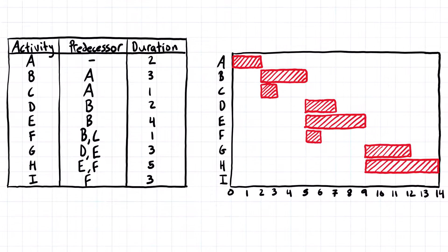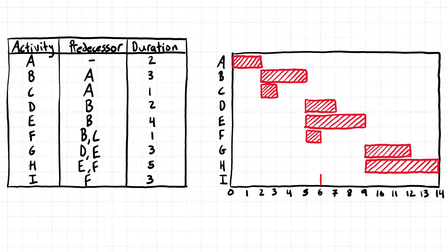And the last activity, I, just has to start after F finishes. So F finishes here at the end of the sixth day — that's where we're going to pick up, it's the beginning of the seventh day — and we're going to come across three days, just like that.